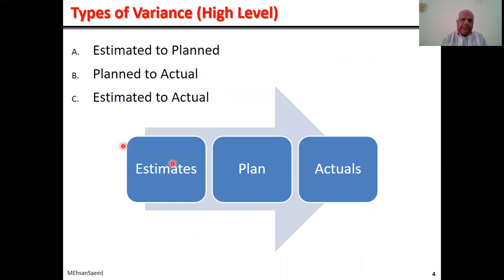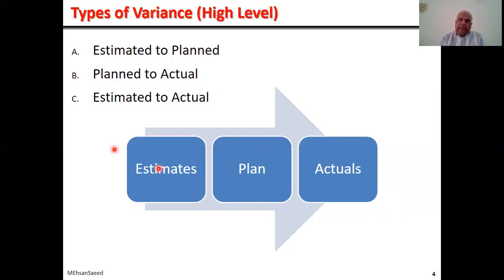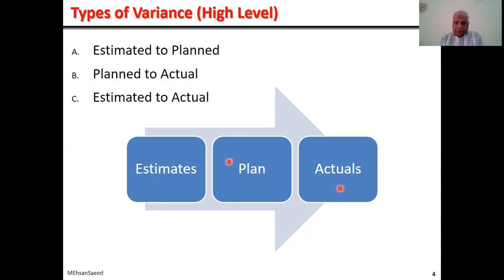When it comes to project data, time-wise, it can essentially pertain to three phases: the estimates, which are usually done during feasibility study or certainly by the time the project charter is signed and issued; then the planned data; and the actual data. Therefore, it is reasonable to expect for any project manager or monitoring and control officer to compare the data at various stages — comparing estimated to planned, planned to actual, or estimated to actual. Therefore, we have essentially three types of variance.